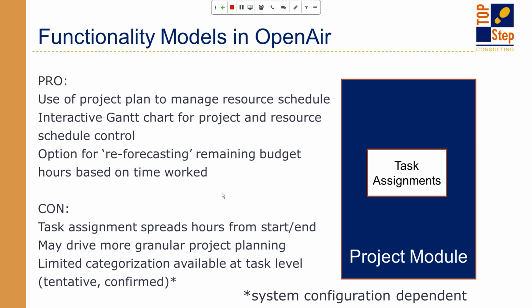Now, what you really give up when you use assignments versus bookings is granularity. And really, you give up almost all of the granularity that's possible when using a booking. Why do we say that? Well, assignments work best for tracking what and who, right? Which resource am I looking at? What are they working on? But it doesn't tell you when they're working on it.